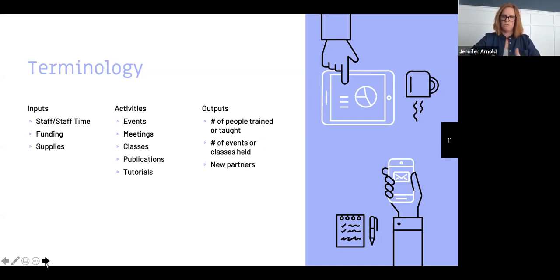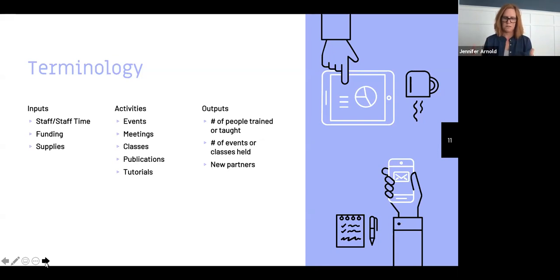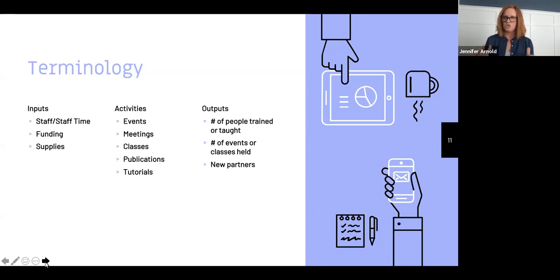Outputs are the direct result of your program activities — quantifiable units of service and products generated by your activities. Outputs are things you can count, like the number of people you've trained or taught, the number of events or classes, the number of participants you've reached. What's important to remember is that outputs don't measure the impact of a program but always answer the question 'how many' or 'how much.' They're always countable things.